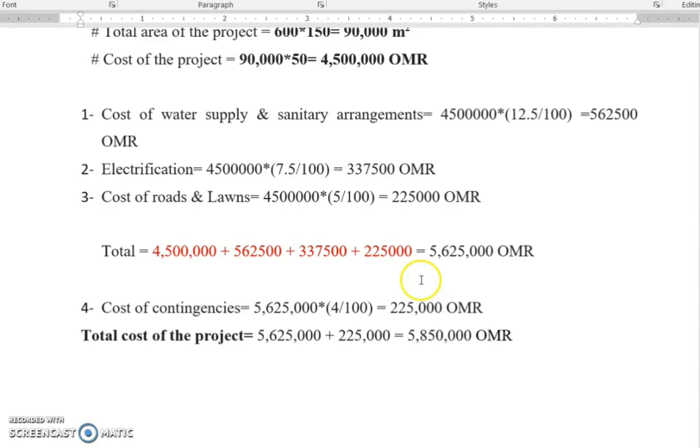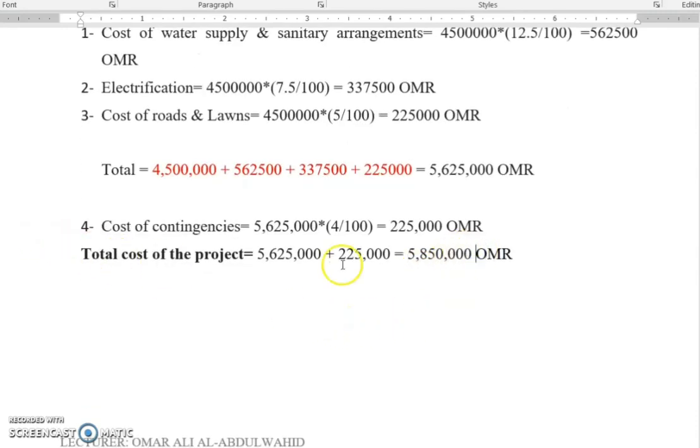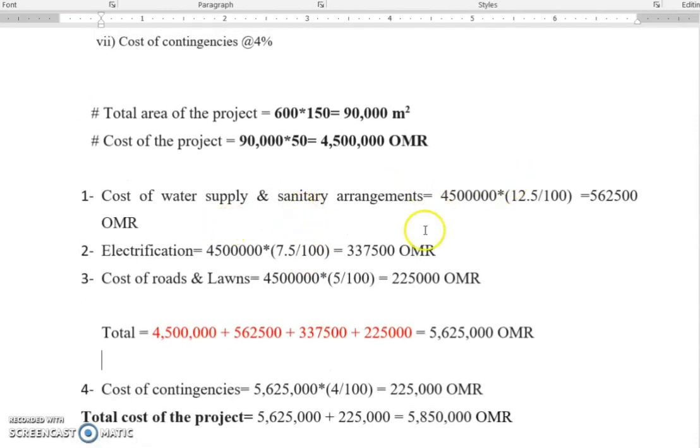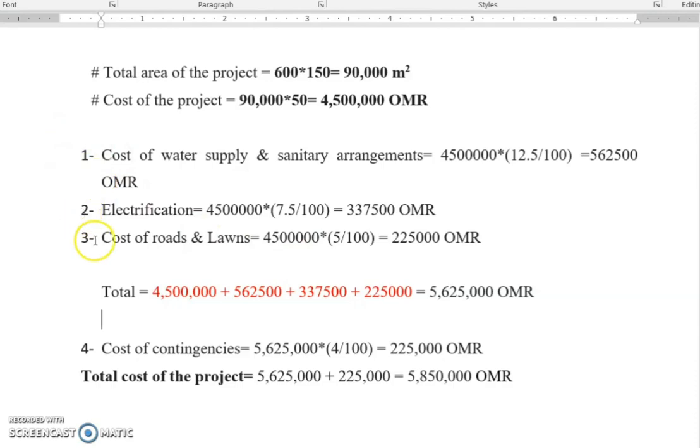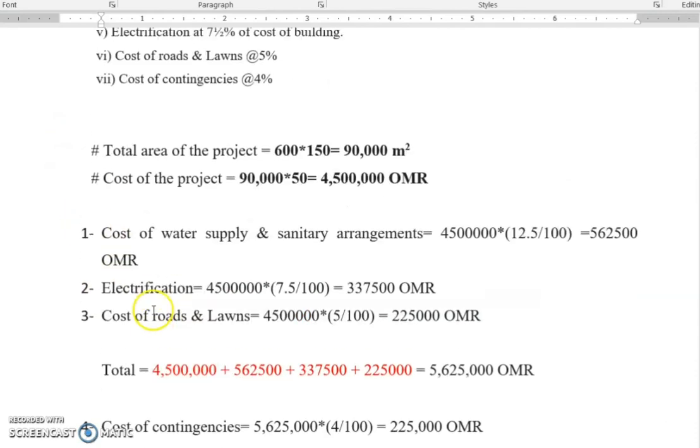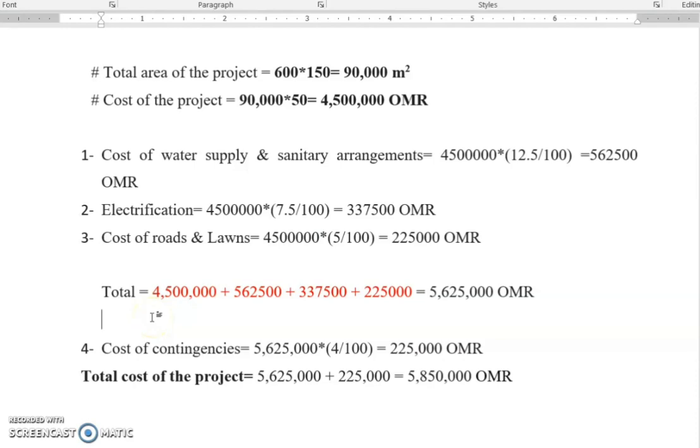And what I want to tell you is that this is a contingencies. You need to, like, for example, I don't want to see like this is the total cost of these three items. It is very important for you as a cost estimator to break down the costs of each item, because you will need these in the life cycle of the project. You'll need these amounts, maybe. So not every time when you are asked, for example, like if someone asks you, give me the cost of the electrifications, you need to do that calculation or to do the math afterwards.